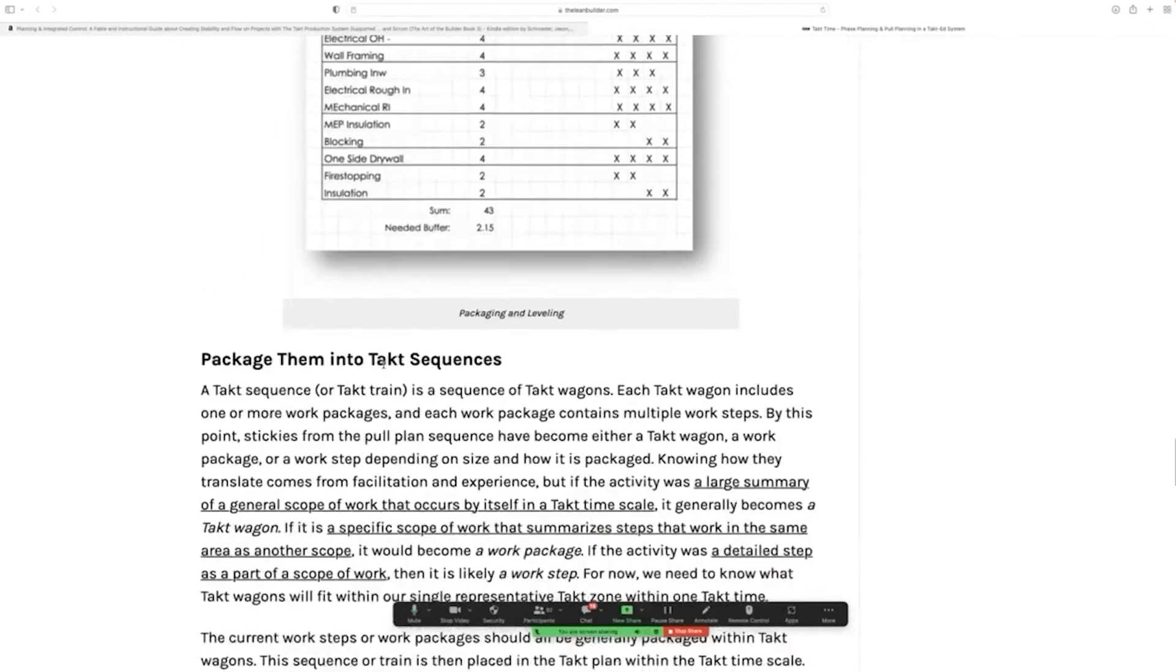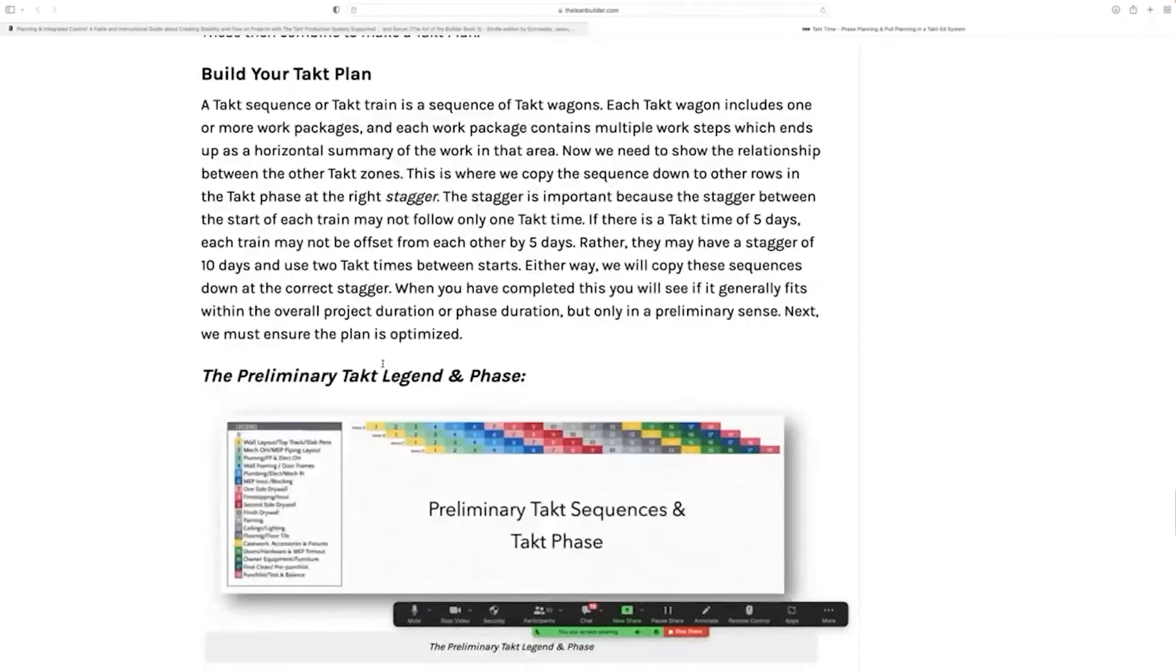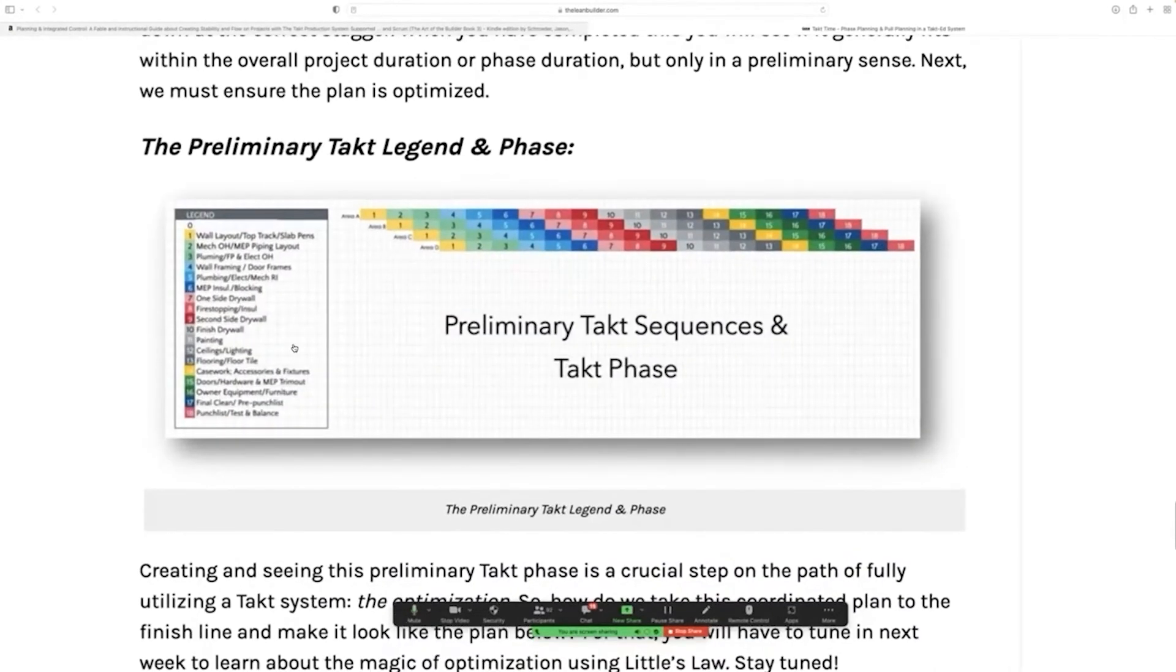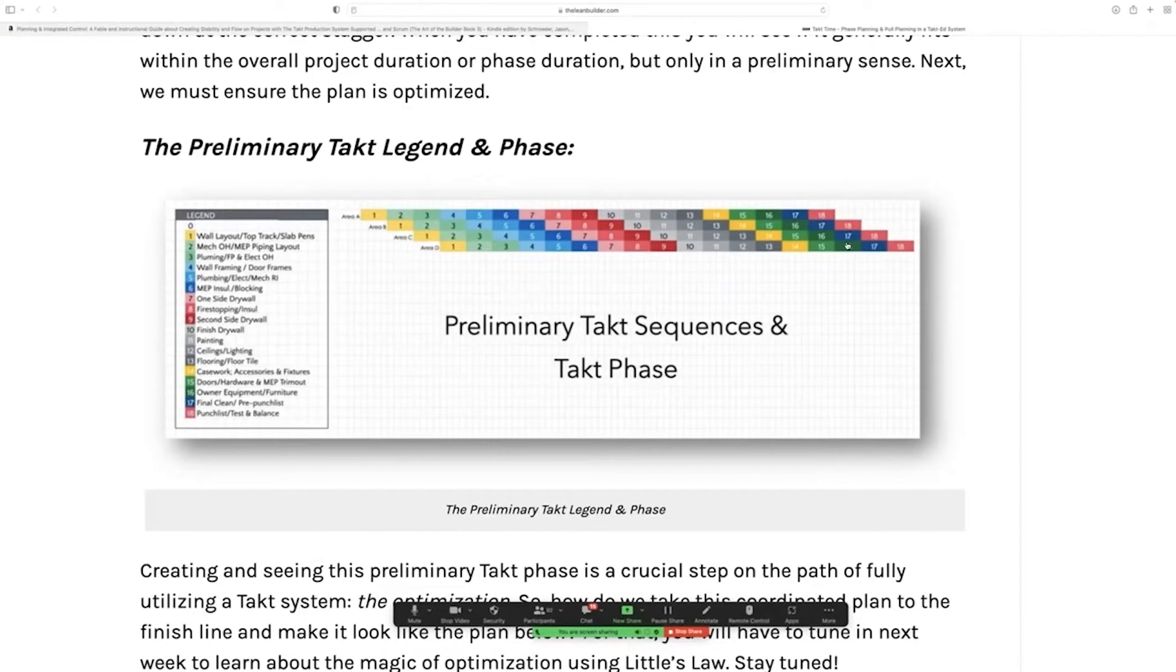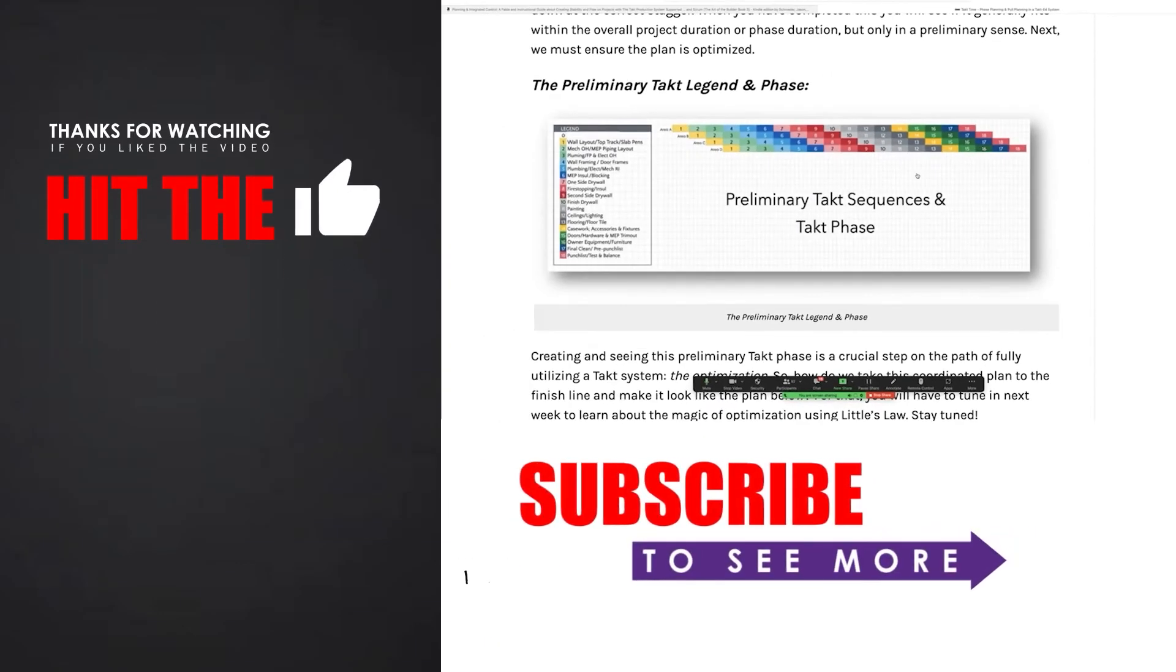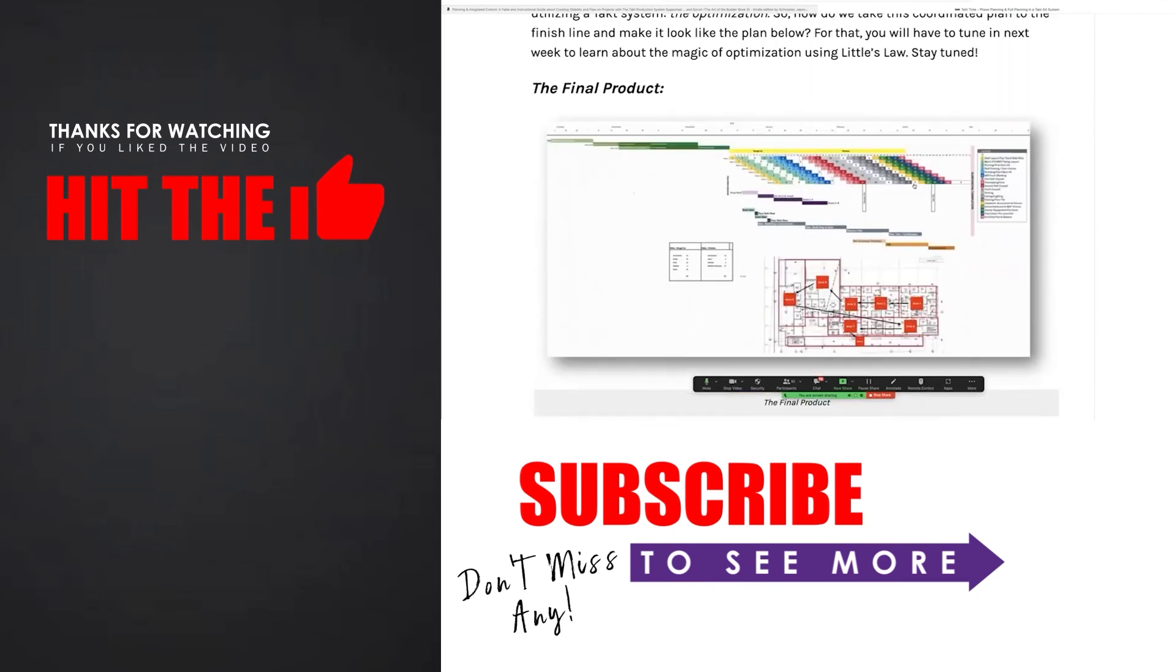Once you have packaged those activities, you're able to create a tact legend and a tact plan. Now you're able to see trade flow. Now you're able to put it into a format that really enables production control on your project site.